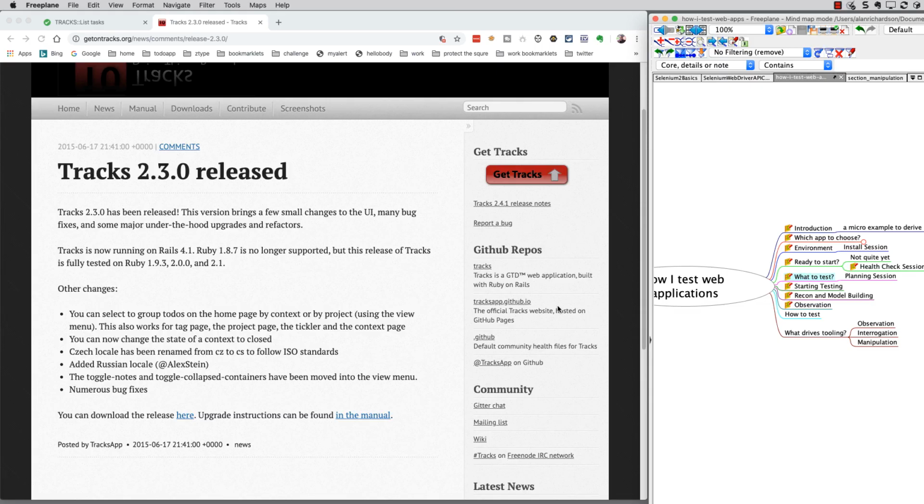But when we get to the very last sprint, when the full story comes together, people are expecting it to take less time because it's a tiny little change. But we look at it and go, well, now the full story is there. So now I have to take into account all the things that we have built in, all the validation rules. How does this integrate with the system and go beyond the story acceptance criteria? So this can really impact our testing.